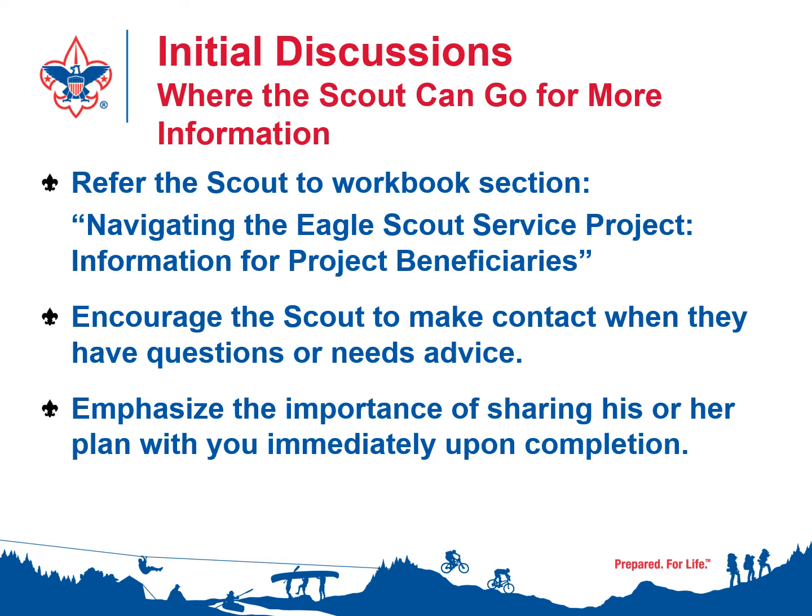Make sure that once the plan is done, you encourage the scout to show you the plan before he starts execution. For one thing, it gets another set of eyes on the plan, to walk through it with him to make sure that he's not forgotten anything. And the other is, it helps put a milestone between the planning process and the execution phase. So he's not planning a little bit, executing, planning a little bit more, executing. That can work, but what we really would like to see him do is plan it and then execute it.